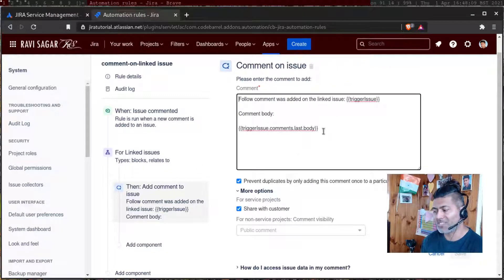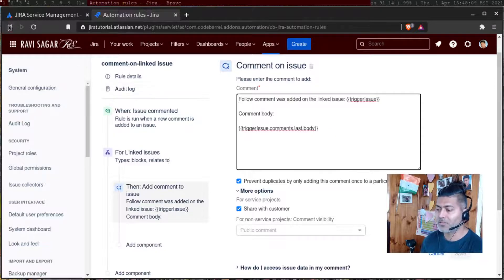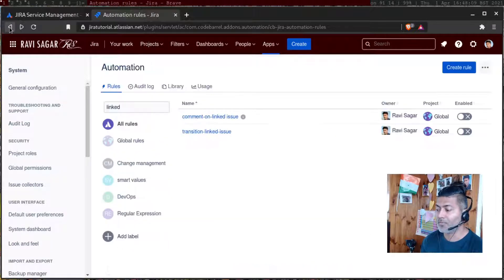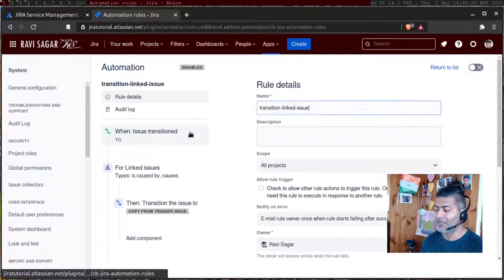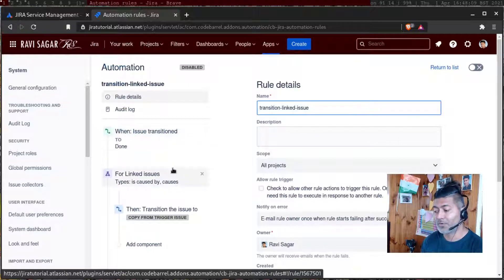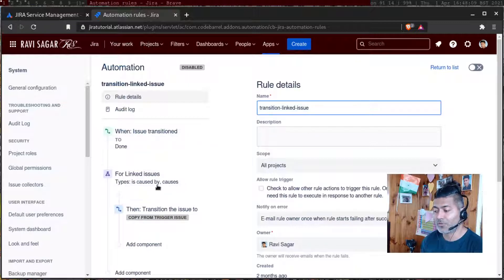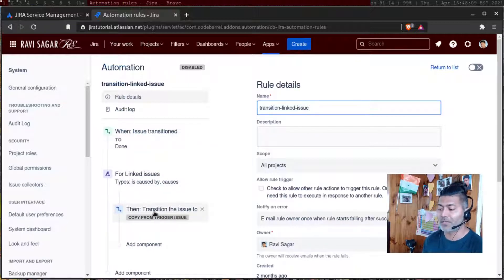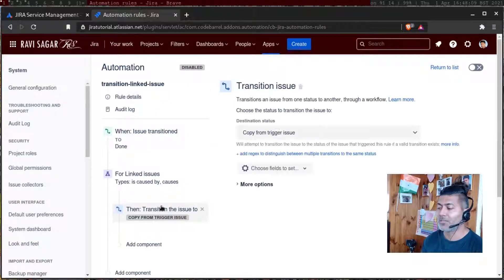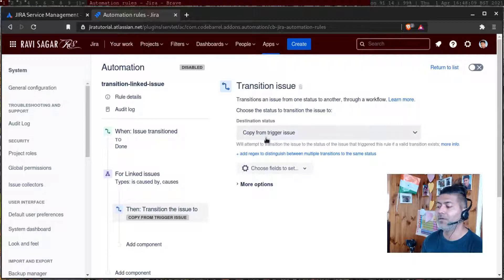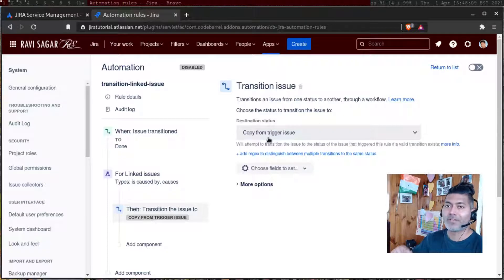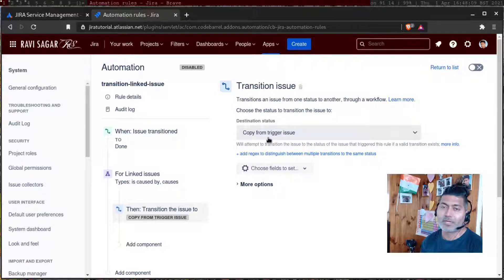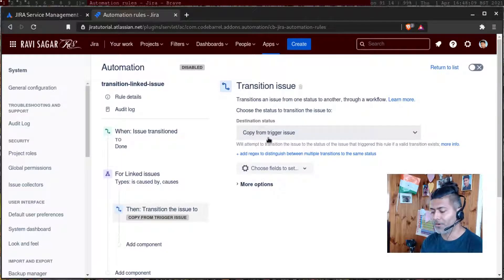You can also transition your linked issues if you want, because maybe you want to transition the issue. So you can do the same thing. But instead of adding a comment, you can say transition the issue and the destination status could be copy from trigger issues. So trigger issue is the software issue. This is something that you can do with the help of automation on cloud.